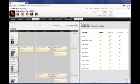So I think, given the reality of fixed budgets or budgets being done on a yearly basis, you need to start with educating the business users about why an Agile approach is going to give them better outcomes, because it's going to give them the opportunity to change their minds based on real data as opposed to issuing change orders when unfortunate things are discovered. Now, you may only deliver 1 or 2 releases a year to start off with, so that might not be that different than a traditional waterfall-based approach, but internally you're working with sprints so that every 2 to 3 weeks you are always able to demonstrate the current state of the process.